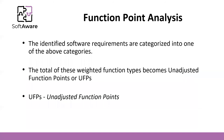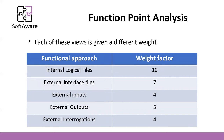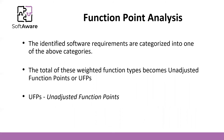We identify the software requirements and categorize them into one of these categories — internal logical files, external interface files, external inputs, external outputs, and external interrogations — which gives us the idea of the dimension of the project. From this, using the weight factors, we calculate the UFPs, the unadjusted function points.